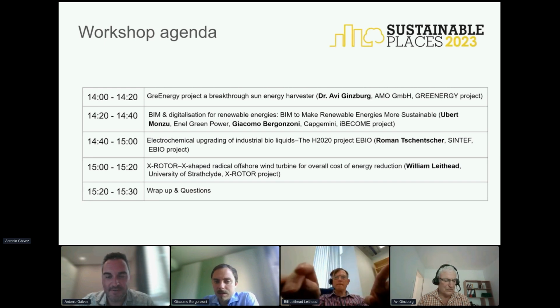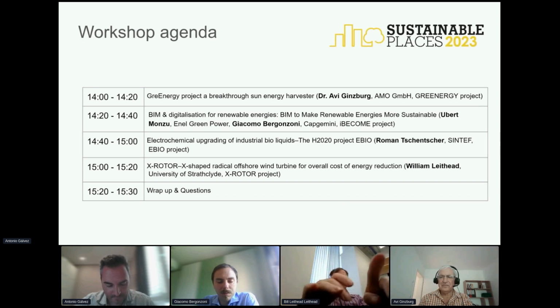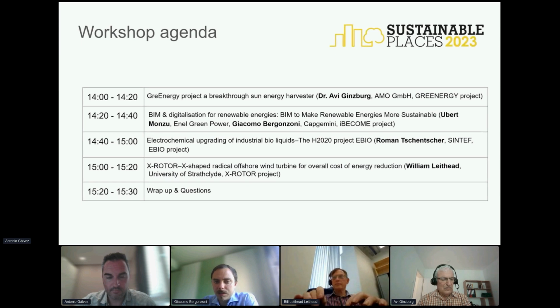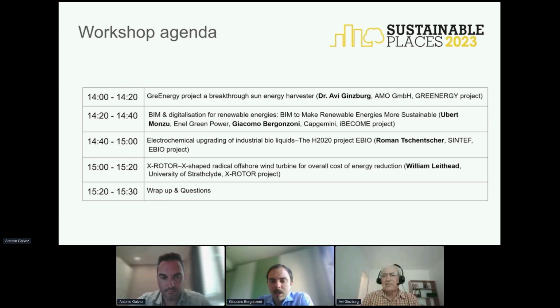Yeah, we actually started from the BIM uses that we want implemented in Enel. So we decided what we are going to use this BIM model for, and our first answer is to apply some BIM uses that are 3D coordination, so clash detection during design development, and code checking, to see if the data model that we defined is correctly implemented in the BIM object,